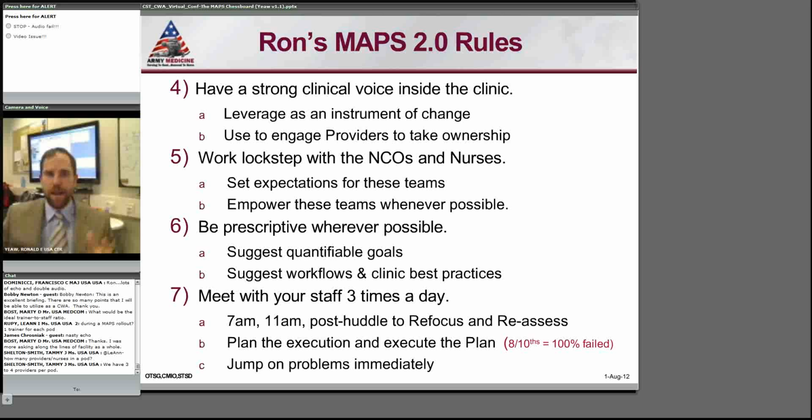Again, with a 4-week MAPS 2.0, my goal for you is that you're done in 3 weeks, because that last week is sustainment. And truly, I want you done in 2 weeks, because that 3rd week, I really want you to start training that workflow. I've got a saying in my MAPS 2.0 that something 8/10 deployed is 100% failed. I said earlier my goal was to achieve escape velocity.